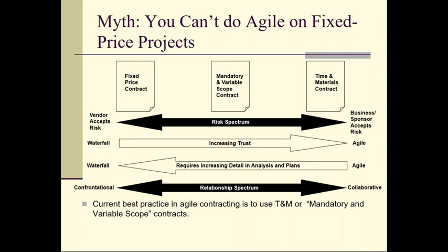Then during the Agile phase, they're also still protected because their estimating approach, the Agile story point estimating or complexity point estimating, builds in contingencies to individual features as well. So there's contingencies built into the points number. So maybe a particular feature was estimated at 5 points, but it had some risk in it, so we upped it to 6 points to add some contingency, 20% contingency for that particular feature.